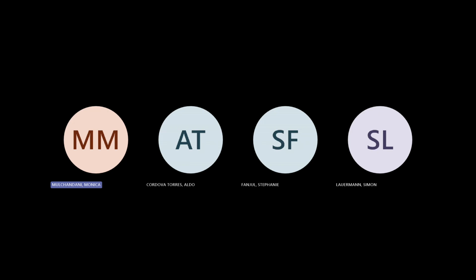SCA has so many departments, so every department has its own role to play in a project. Pre-scope is done by ODC. Once they are done, then the scope and design is done by the A&E department, architecture and engineering. Then RFC, bid and award is done by the contracts department. And then construction management does or monitors the construction part of it. And the closeout is more or less paperwork to close out the project.